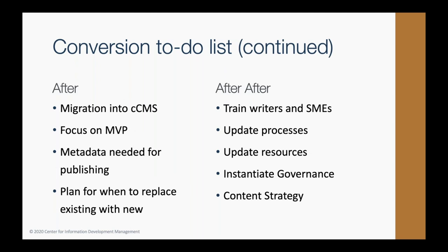In terms of that to-do list for after the conversion, once your content is available in the DITA XML format, you'll have additional tasks to take care of before you can replace the old content with the new content on your delivery platform. If you didn't do any pre-conversion cleanup, there will be some things that you'll need to address. I encourage you to focus on just the things that will negatively impact the experience of the content on your site, such as broken links, images, and making sure the content appears correctly. Make sure that you have all the metadata in place that you need to publish the content.